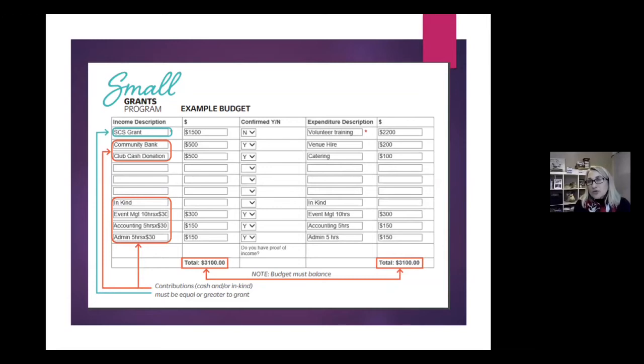So how would you reduce the size of the project that you submitted in order to stay within the amount that they gave you? So if I think of something like we're doing a playground, and if I missed out on the $5,000, then I would not put one extra seesaw in. I'd only do the 3 seesaws, not 4. So it's like a contingency plan.